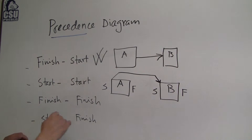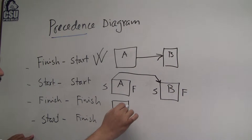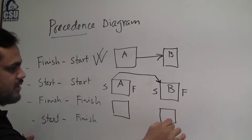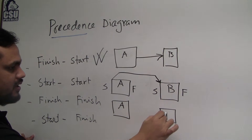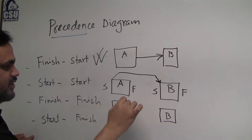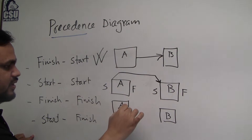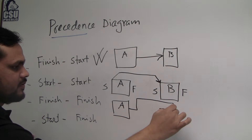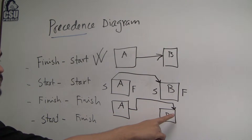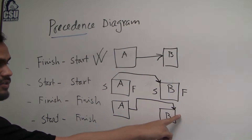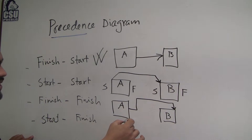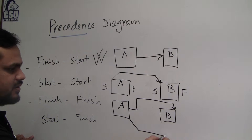Then finish-to-finish: activity A, activity B, finish-to-finish. B can finish when A finishes. There are different ways to represent this on the diagram — you can draw the arrow from the finish side of A to the finish side of B.